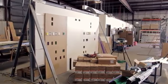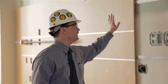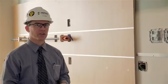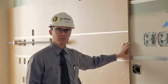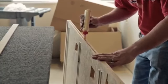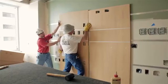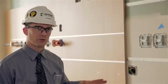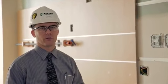First we did a mock-up with just plywood, and then we did a mock-up with some MDF board, and then we mocked one up that was the final laminated finished product. And we learned a few things about how this would all come together. Any variation tolerance in the panel itself would show up between panels. And so we did perfect our detail with a tongue and groove at each panel so that once you lock them in, that really prevents them from pushing in and out. The quality of the work is improved in this process because you have almost manufacturing style control of the work.